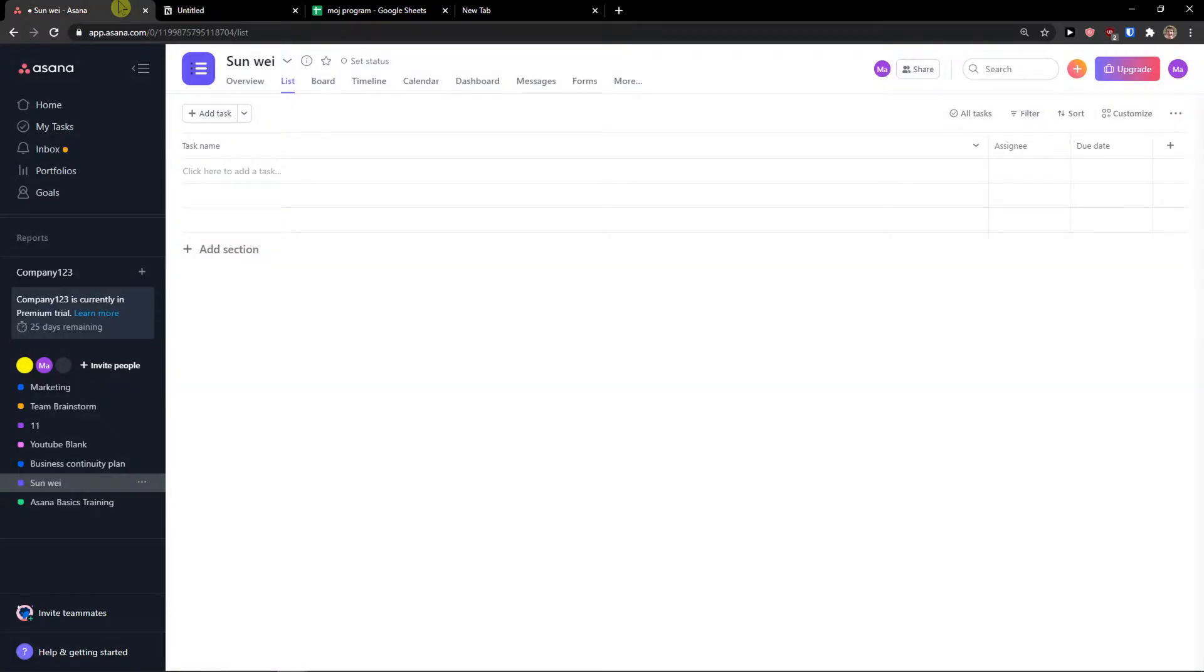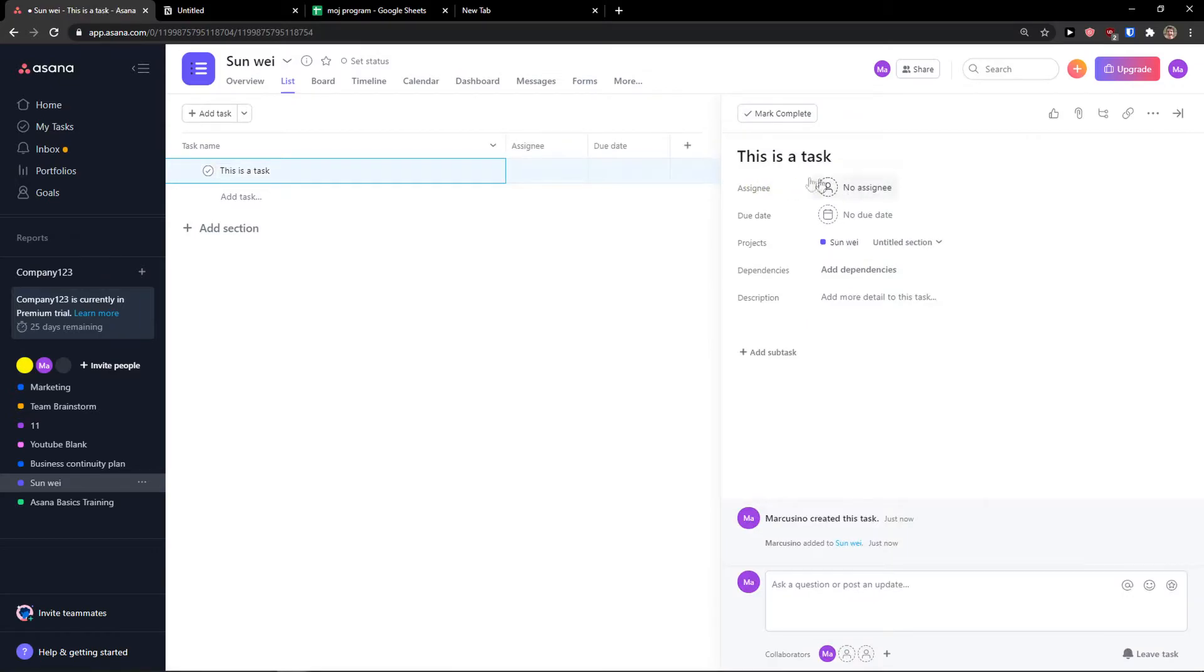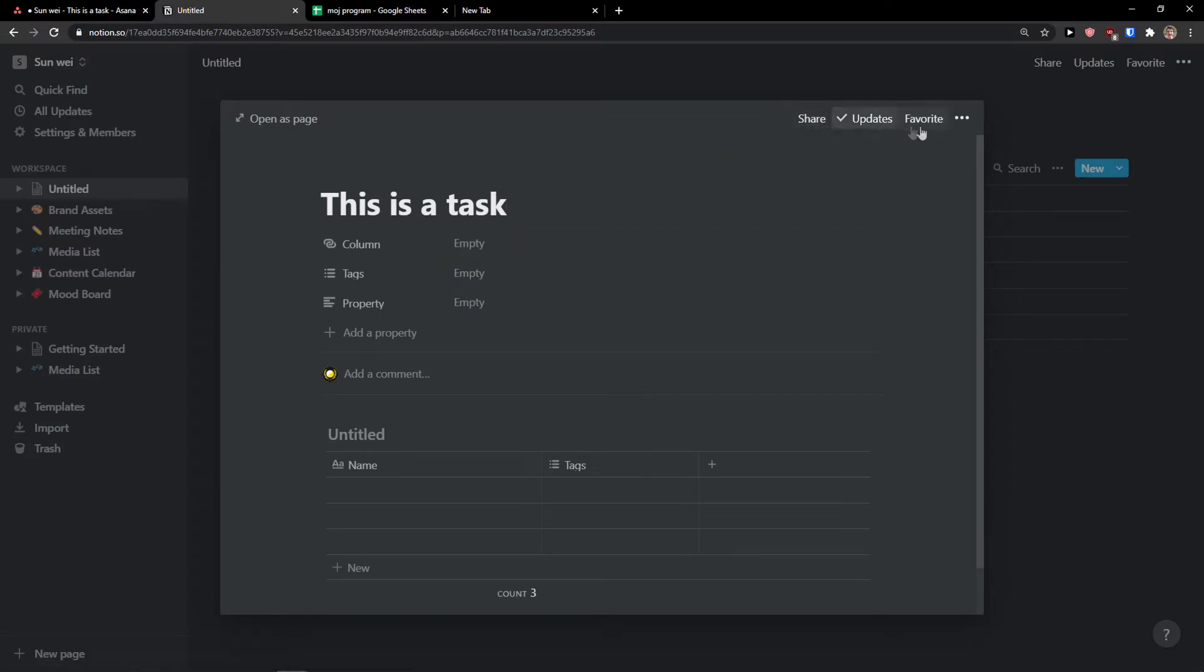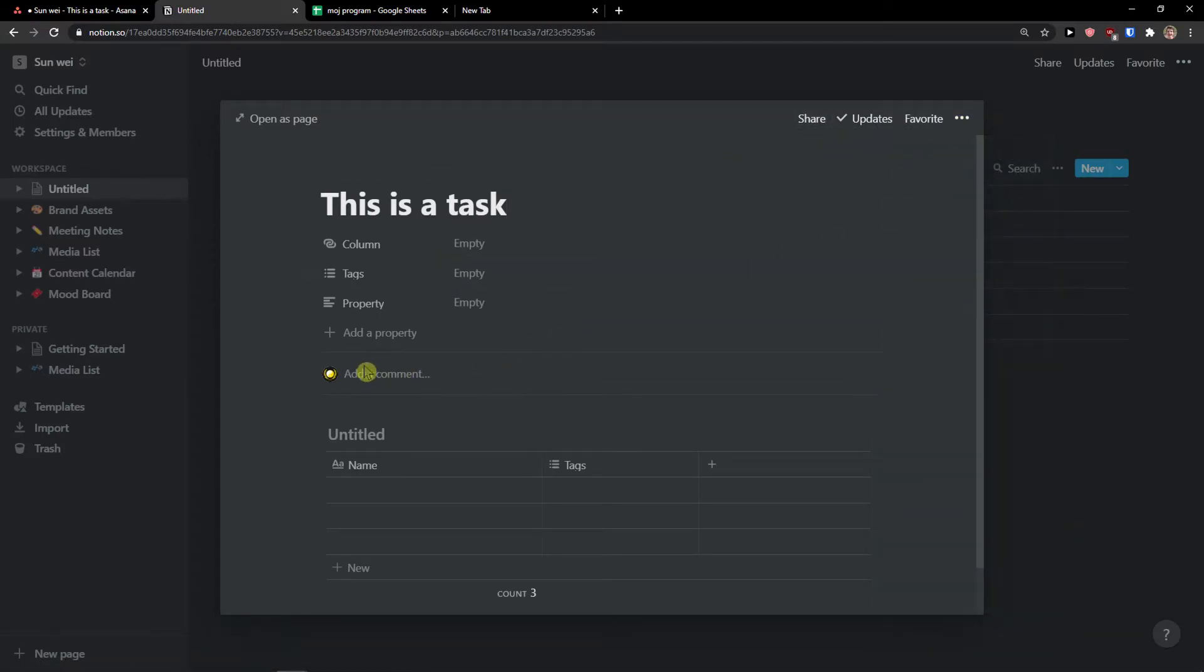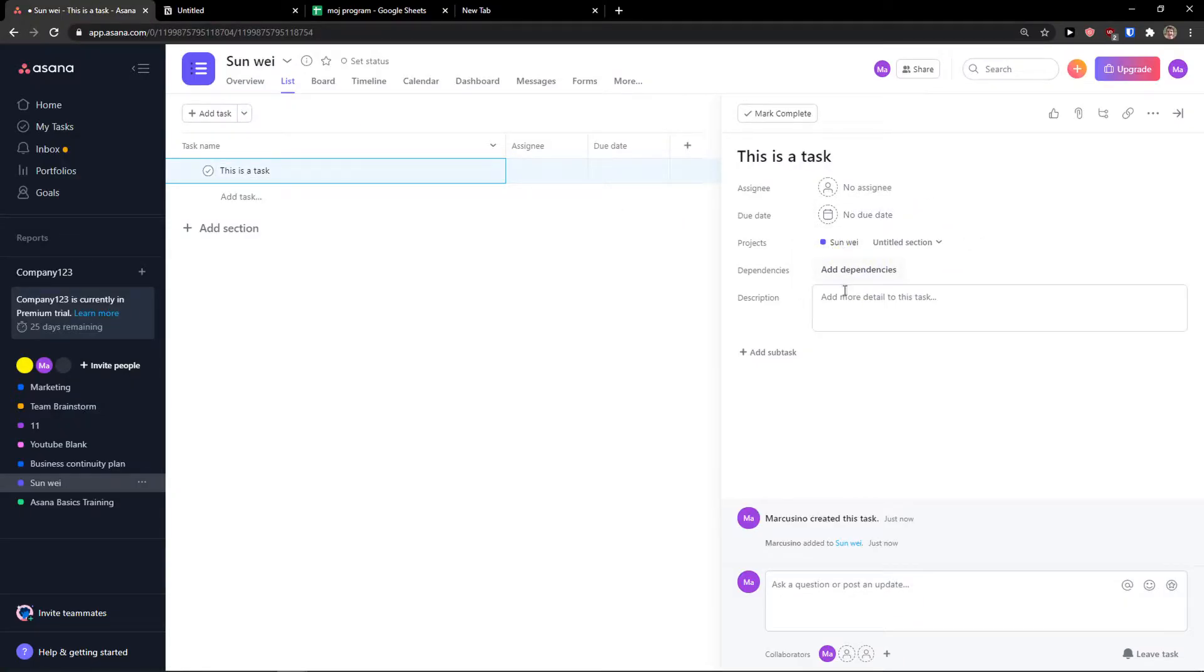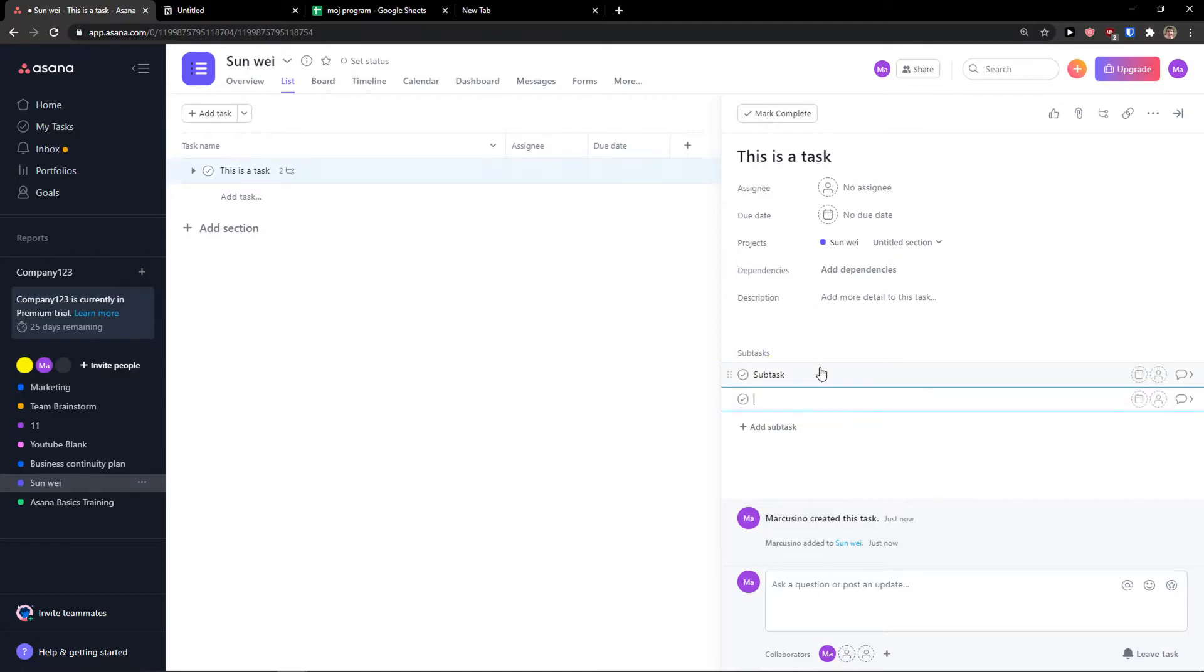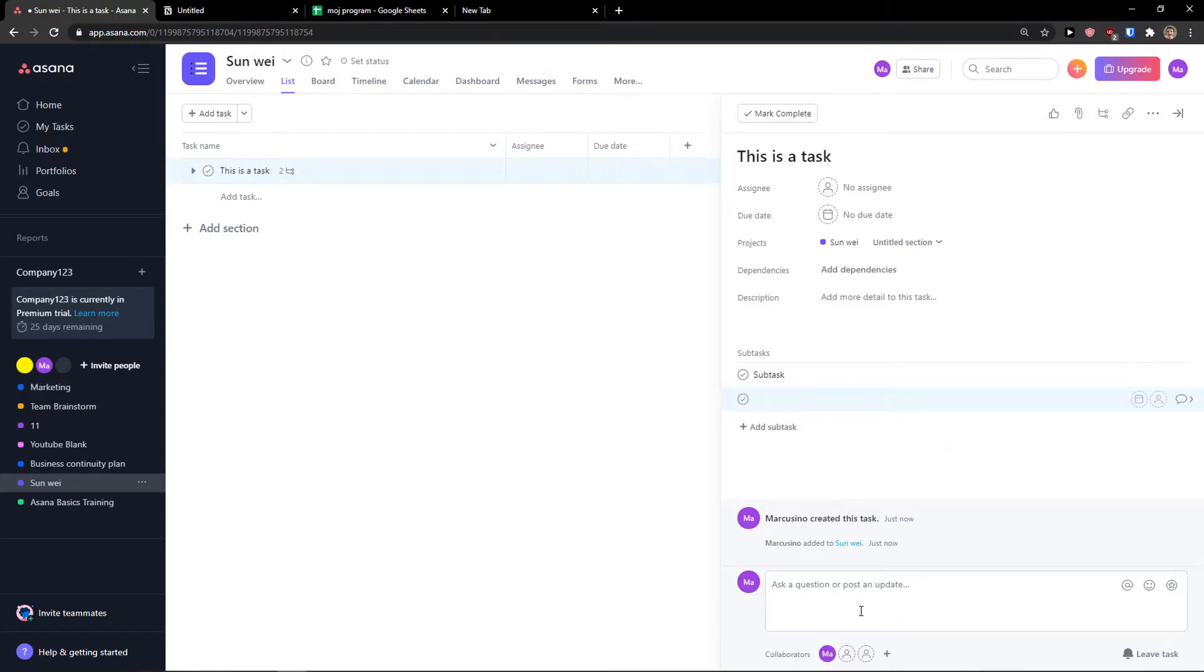Let's say I have a database for financing of a project with all the projects here. I can simply open the task and have all the numbers. In Asana, you need to add a task, task name. This is a task. Click on details. You see no assign - you can assign it. Then due date, projects, dependencies, description, and you can add a subtask. Or go to top right and add attachments, copy task name, go full screen, delete the task, or add a comment. You see collaborators here and can mark it complete.